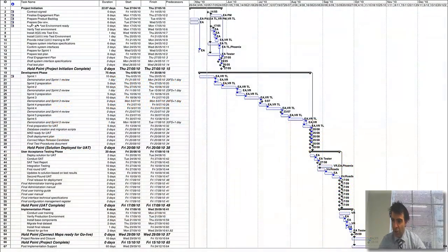So this lovely looking Gantt chart is for a 6-month project for a fairly complex GIS web mapping application, and just one web mapping application. So what we have here is a series of meetings to gather requirements from each of the different business units. Quite a bit of development time there for meeting these requirements, some testing time, and then rolling that application through the development, staging and production environments, some training time, and more than likely more meetings to discuss budgets and further